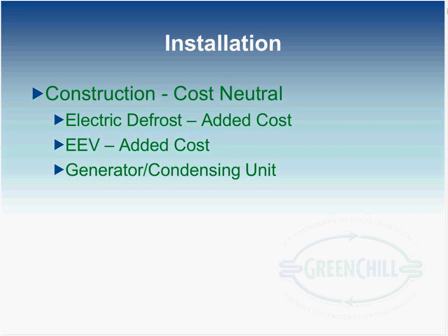Quick slide here to talk a little bit about installation. I think Scott mentioned earlier about the cost. For every one of these installations, we considered it to be a cost-neutral installation. We work very closely with the manufacturers of the technology as well as the installing contractors. There were some call-outs for us that we did have a few added costs associated with these programs, but that was more of a timing issue than it was the technology, meaning that we had already had the stores approved, engineered, and out for bid/construction at the time we chose to implement this technology.